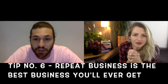My first project, the biggest learning was with the plaster, and also I didn't account for boxing out the boiler, like creating a cupboard for the boiler. It's only small things, but these are additional costs that weren't accounted for. Luckily it was my friend, so I went straight to him and said, look, these are the additional costs, and it was fine. And I'm glad I did that at the beginning. Now, if I tried to cover that up and it got to a later stage where he found out that I wasn't being transparent and honest and ethical, then you could lose that client. And I think that repeat business is the best business you'll ever get. You just need one good client, and that could be your bread and butter. So once you prove that you're good, and you are honest, and you can make him money.